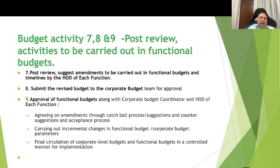Activities seven, eight, and nine are also common. Post-review of the respective budgets by the HODs, any amendments needed are carried out in the budget prepared by the operating team. Once reviewed by the HOD, these are submitted to the corporate budget team for approval. Approval of the functional budget is done along with the corporate budget coordinator and the HOD of each function through a catchball process — where the HOD and corporate coordinator each suggest positions and mutually agree on a set of parameters or targets. This is followed by incremental changes in the functional budget and final circulation of corporate and functional budgets in a controlled manner. The CEO or MD can also participate in this process.